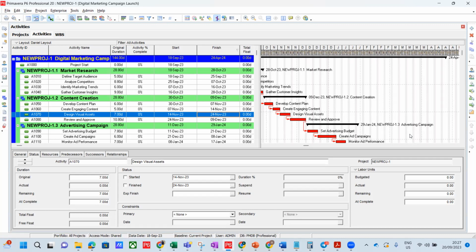Then I say, okay, the reason why we put lag is because we pour concrete and we expect the concrete to set for another 5 days before we start erecting structure. That's why they put lag. But the best practice in that scenario would be finish to start. Let me explain that again. A and B are finish to start. That is the relationship. A is concrete pour, when you pour concrete, and B is concrete set. You want the concrete to set or cure.